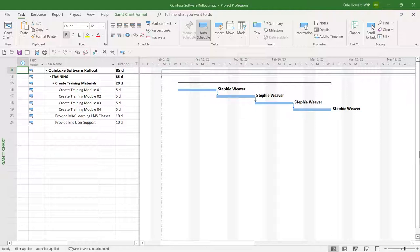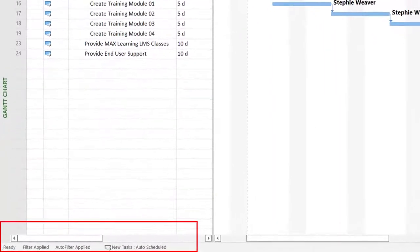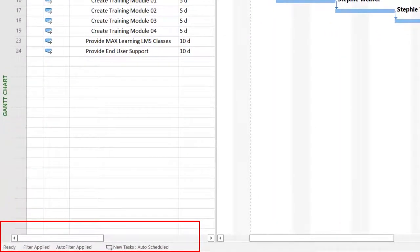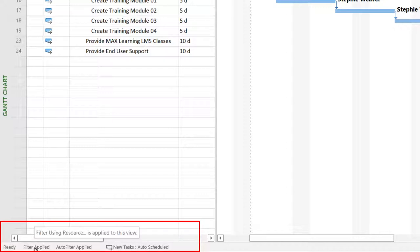Here's how you can find out for sure. If you look in the lower left corner of your Microsoft Project application window at the status bar, Microsoft Project will display one or two messages telling you about filters. I can see the 'filter applied' message, and if I float my mouse pointer over it, it says the 'using resource' filter is currently applied. To the right of it, I see an 'auto filter applied' message, and I can see auto filters are applied to the duration column.